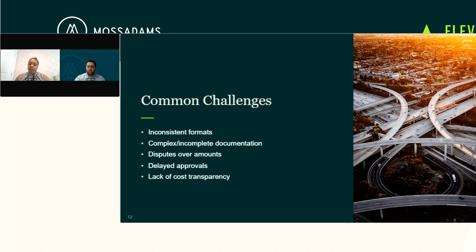So common challenges, there's a bunch of them. We have listed here the 5 most common and major that we see. So payment applications that are just inconsistent in format. That could be from month to month, the format changes. That could be subcontractors and vendors are using a different format than a general contractor. All of that, it takes time to review. It takes time if you're looking at an invoice from one period to the next period, and you can't trace the dollars and cents back and forth. So we do see that pretty frequently.